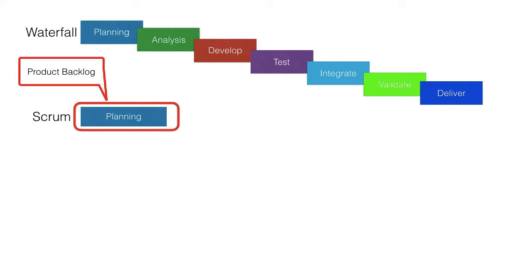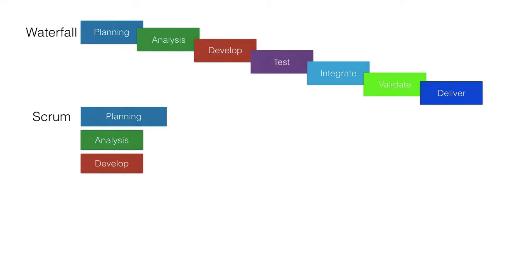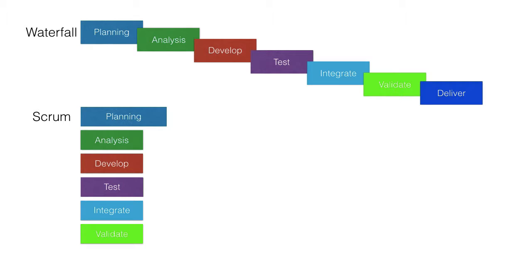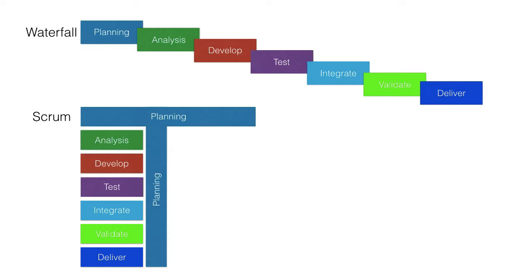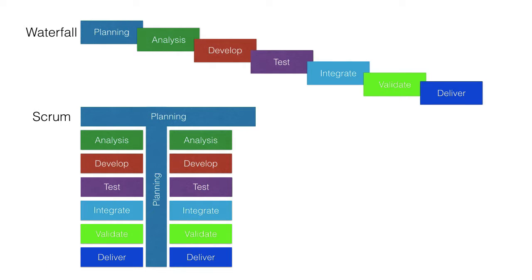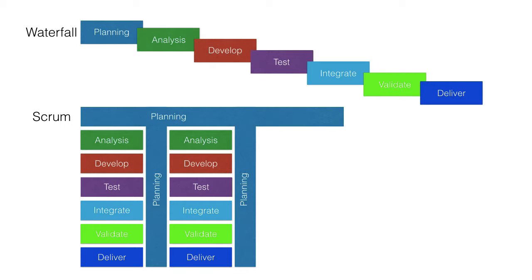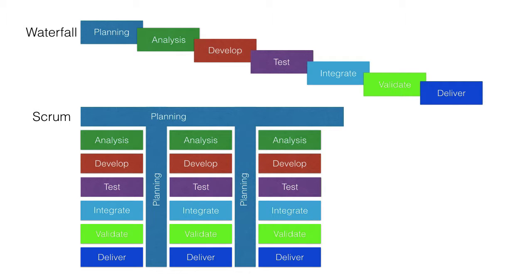The development team takes the sprint backlog—they analyze, they develop, they test, they integrate, and they validate and deliver that work in the sprint review. More planning at the product level is done; this is the product backlog grooming sessions. More planning at the sprint or iteration level is done; this is the sprint planning meeting. The work in the next sprint is done and delivered. The sprint includes a little product backlog grooming, a lot of sprint planning, and then the work of the sprint.